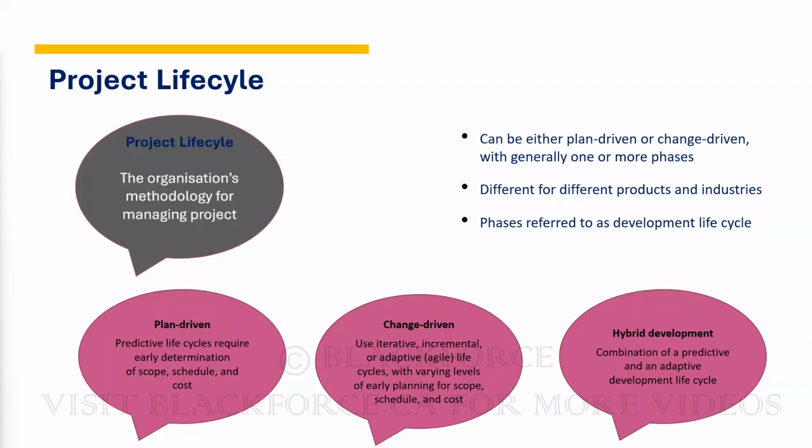The waterfall, the traditional life cycle, is the common one. That's what we call the predictive life cycle. So in this situation, what do you do? You plan ahead. You determine your scope, your schedule, and your cost early enough, before the project starts. When we talk about putting all these business cases together, doing all the cost benefit and the details, you plan it ahead. So that's what we call plan-driven.